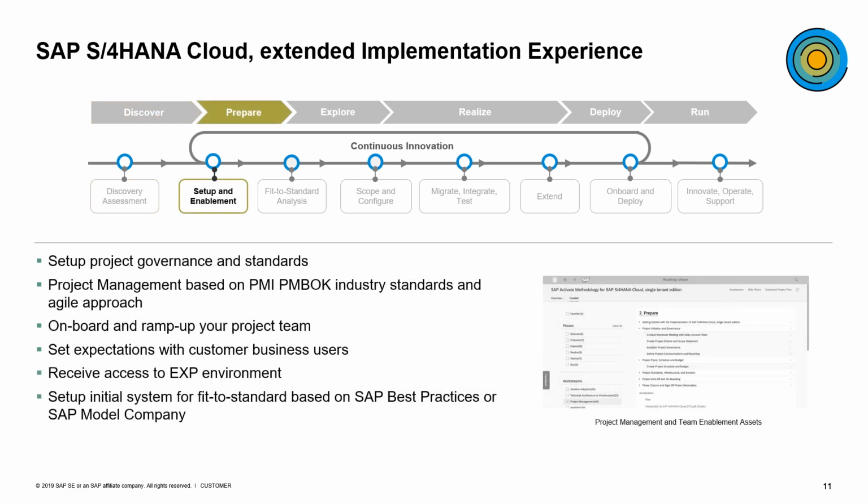In the Prepare phase, we are looking at organizing the project governances and standards. Within the methodology, we offer templates that are based off of PMI standards as well as the Agile approach. During Prepare is where we want to ramp up and prepare the project team. We also want to set up expectations with the business owners.